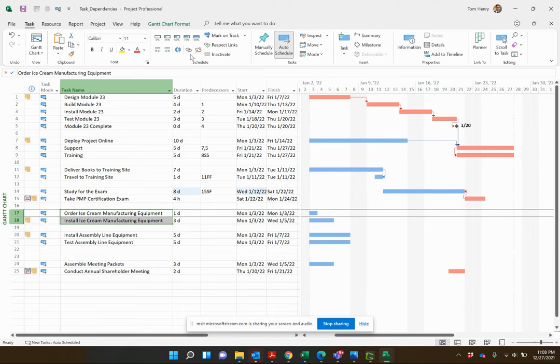Counting the days, we get seven working days because Microsoft Project's default calendar excludes weekends. But FedEx delivers on Saturdays and Sundays and said five days — not five business days. So I double-click the link again and change the lag to '5 edays' — elapsed days — which ignores weekends. The equipment will arrive Sunday, but since we don't work Sundays, installation is scheduled to start Monday, the next working day.